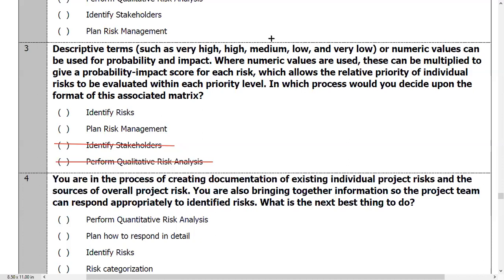So, my friends, this stuff is very important for you to focus on. The difference between the risk strategy versus the risk methodology is the strategy is a more general approach to managing risks. It's broader. The methodology is going down to the nitty-gritty of the approaches, the tools, the data sources. It's really more about the hands-on parameters around the risk management. So risk strategy is a broader perspective, a more overarching mindset to how you manage the risks.